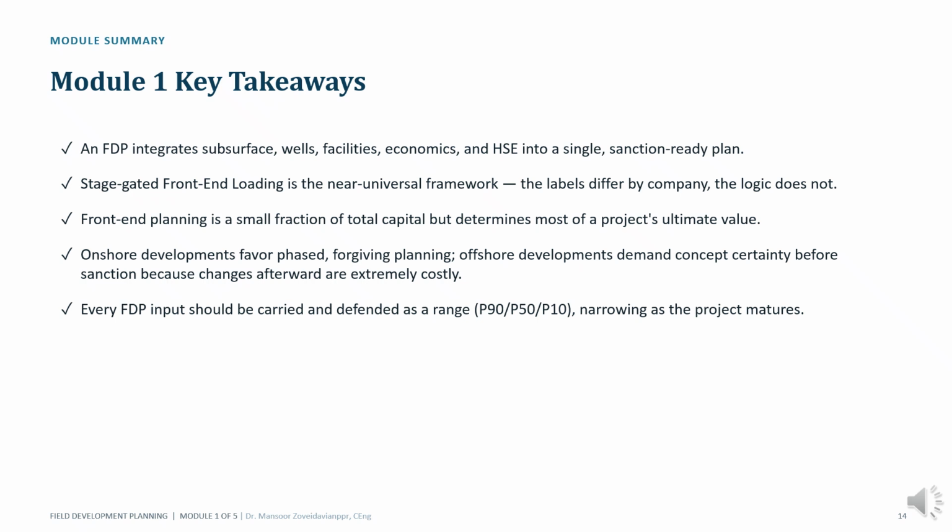Let's summarize the key messages from this module. First, a field development plan integrates subsurface, wells, facilities, economics, and HSE into a single development strategy. Second, stage-gated front-end loading is the industry's primary framework for managing uncertainty and guiding investment decisions. Third, front-end planning represents a relatively small share of project expenditure but has a disproportionate influence on project performance and value. Fourth, onshore and offshore developments use the same planning framework, but offshore developments generally require greater concept certainty because changes after sanction are much more costly.